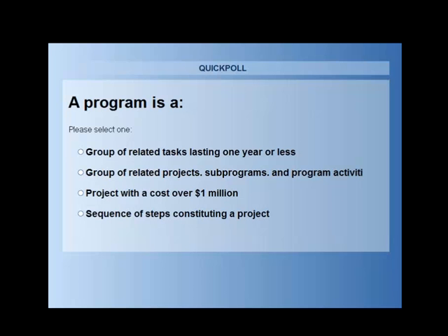So the project management office delivers specific project... The answer is A. A is incorrect. The project management office does not deliver specific project objectives and doesn't control assigned project resources. That's essentially the job of the project manager.